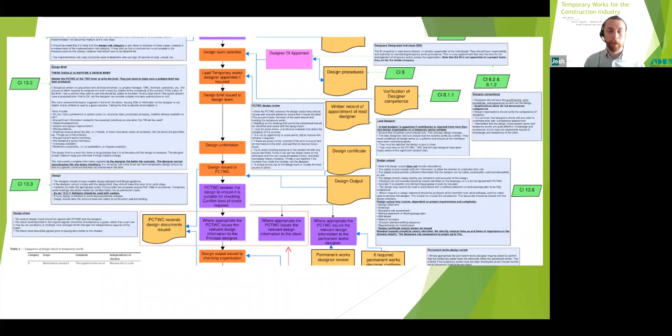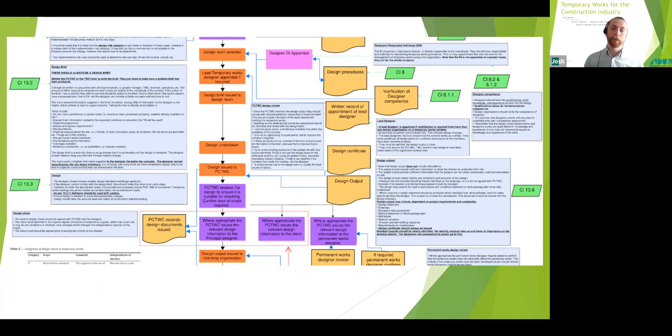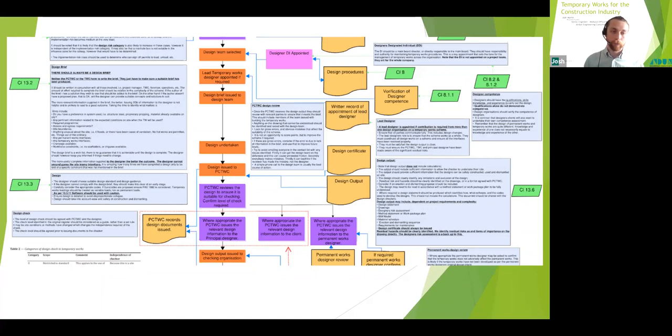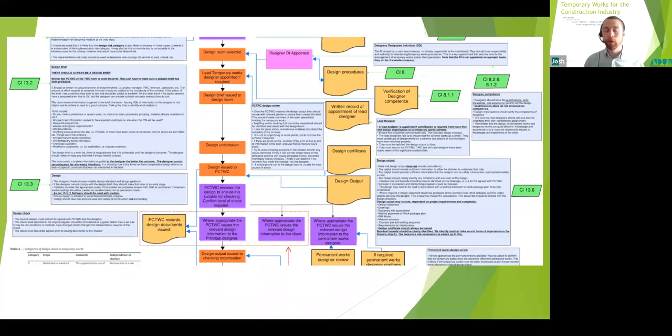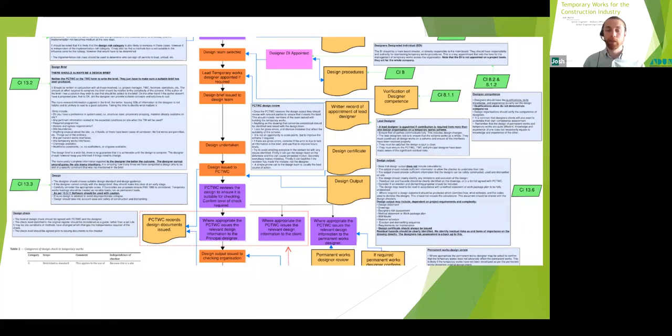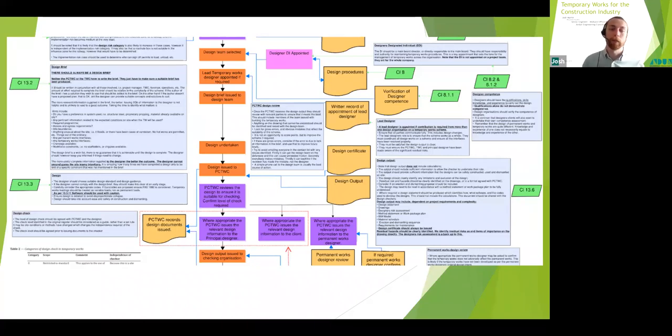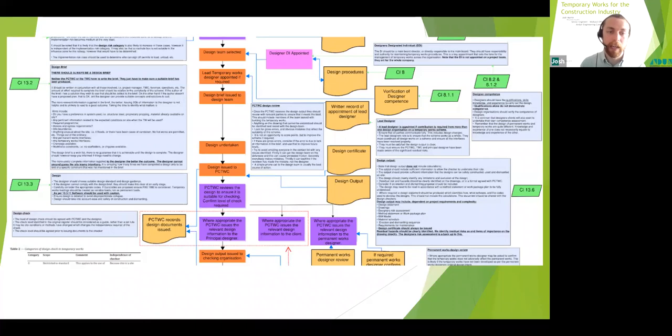So at this stage, the temporary works—once you've reviewed it—the temporary works coordinator will issue the design to, if necessary, the principal designer, the client, or the permanent works designer for review, where appropriate. This enables the relevant parties to comment on the scheme, and from experience has been very helpful, especially for multidisciplinary checks across the scheme. However, taking a red pen to calculations and point scoring really isn't helpful. The main aim of this process, of this particular step, is to review the concept of the design and its philosophy and considering it and commenting upon it. That's really the aim behind this stage.